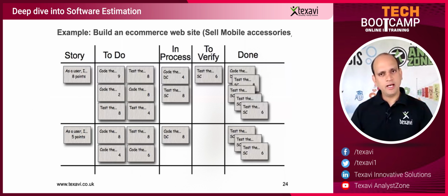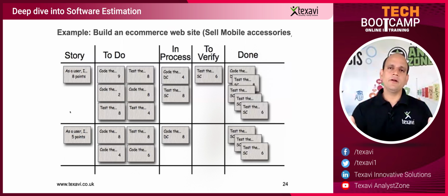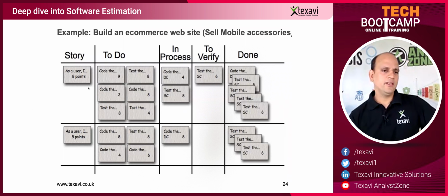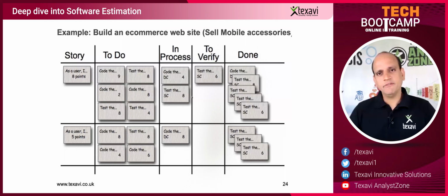you've got the estimation done for the stories that you have in the backlog. And then these could be put in the context of a sprint or an iteration, or this could be part of the big picture product backlog. So then you can say, okay, I've got these story points of 8, I've got 5 points, so together 13. I think we should be able to do these because we have roughly 14 points of capacity still in this particular sprint, as the total velocity is, let's say, 100 story points for this sprint, which is 3 weeks with 2 developers, for example.